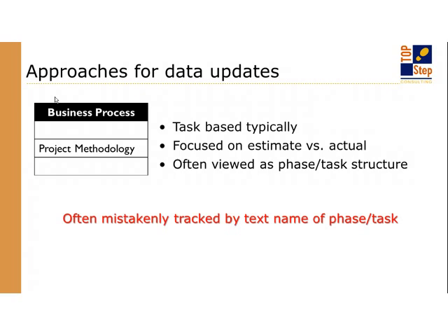Okay. The big mistake that I see when we get involved in customer accounts is, quite honestly, people try to track that information at some level, but they rely completely on the name of the phase or the name of the task. And that's a free text field. It's hard to lock that down unless you basically dictate a template always. And project managers are held to a strict project schedule where they don't have any ability to modify it, augment it, or remove things that are not applicable.